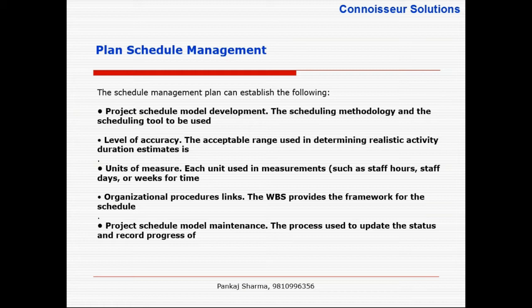See, again, I'm not saying you to be at extremes, minus 25 to plus 75. But in a realistic environment, when you give estimates to the customer, you can say: I cannot commit resources on the basis of this estimate, but based on whatever understanding I have of the project, the estimate is this, though it might vary by plus or minus 25%. I can give you more definitive estimates once we have gone through detailed requirements or detailed scoping. So somehow we have to convince the customer.